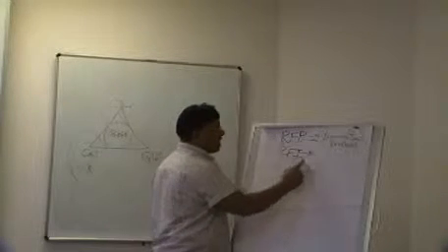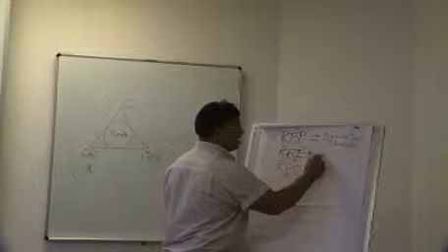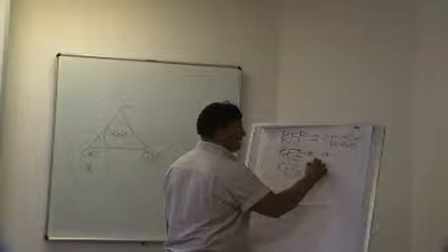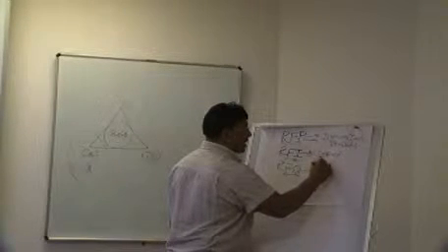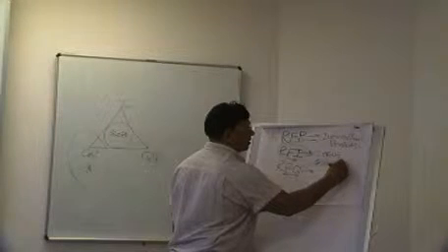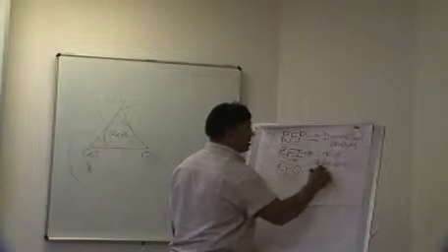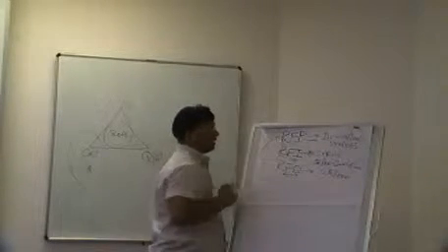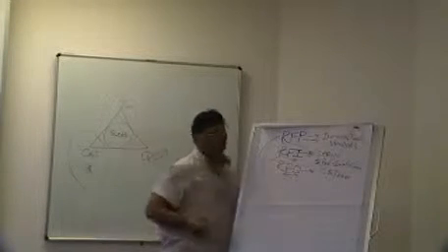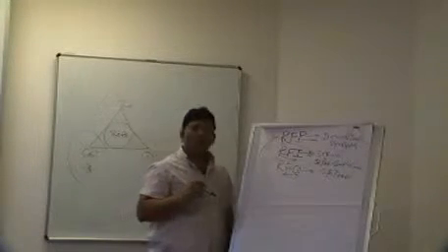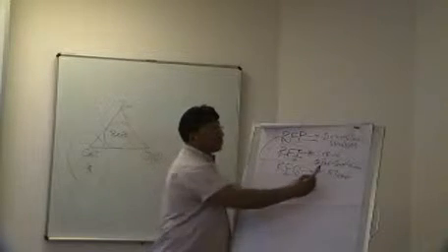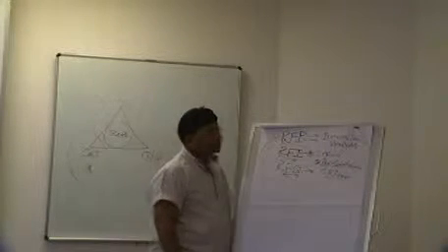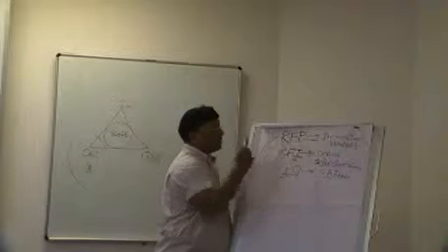So, an RFI can also serve as a pre-qualification criteria for an RFP. Pre-qualification for an RFP. So before you would go out on an RFP, you have already pre-qualified certain potential sources for the RFP.